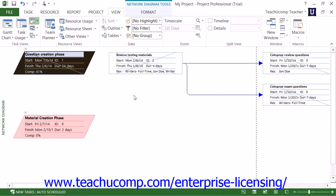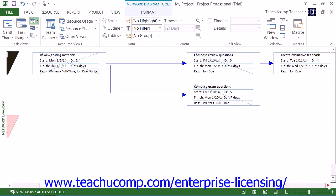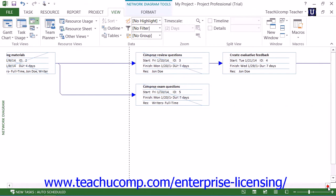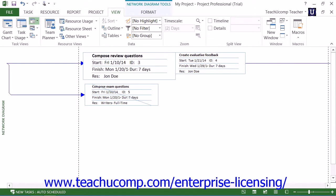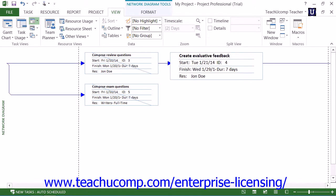Within this view, each task is represented by a rectangle with information about the task displayed in the lines that appear within the shape. Critical tasks appear in red, and non-critical tasks appear in blue. Tasks that are linked together will be shown with a connector line between them.